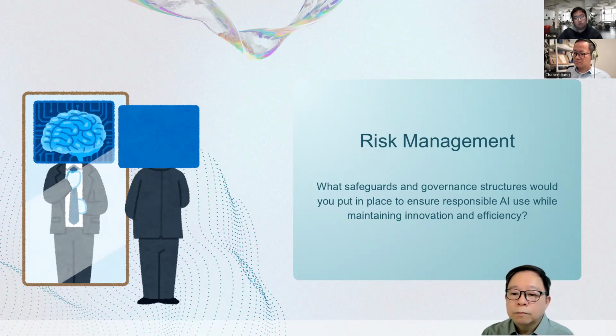Two things you need to take away are the possibility of happening and how big the impact is. You multiply these factors, and then you get a number. You put down every part of this risk, and the higher the number, the more urgently you need to address it. This is what we do in our project management.